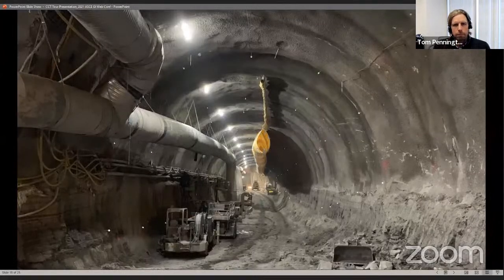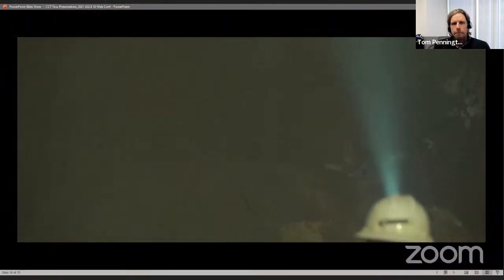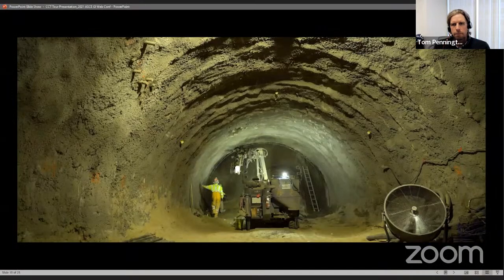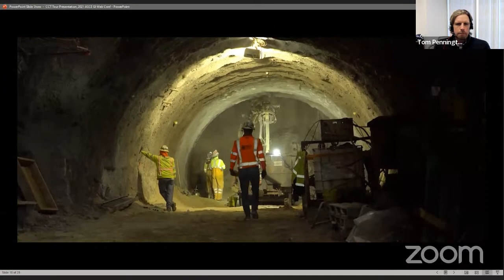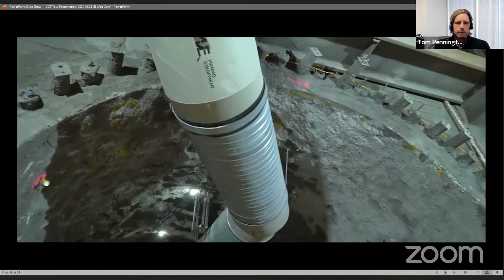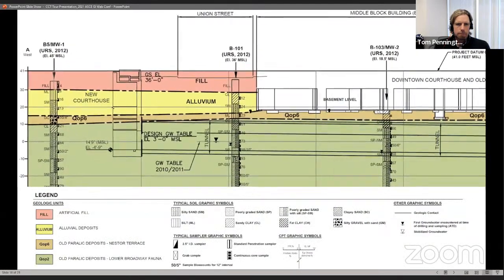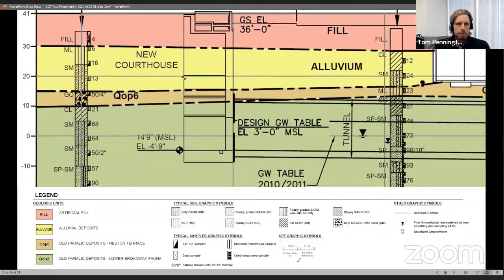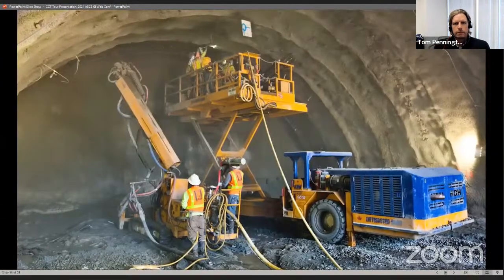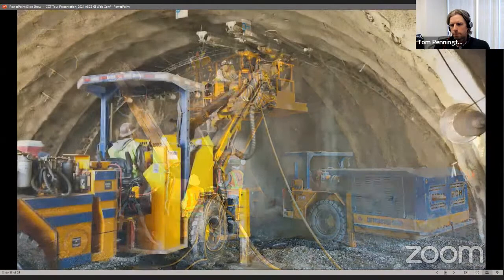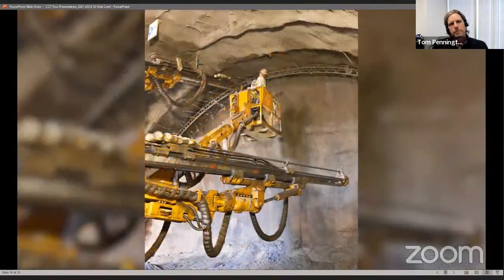SEM tunneling is an observational method of tunneling that involves evaluating the type and behavior of the ground during excavation and determining the best combination of ground support components, a design-as-you-go approach. During tunnel design, the ground support is prescribed based on what is known of the ground from advanced geotechnical explorations. But the design also allows for additional measures and other support elements, known as toolbox items, which may be needed where ground conditions and behavior locally vary.